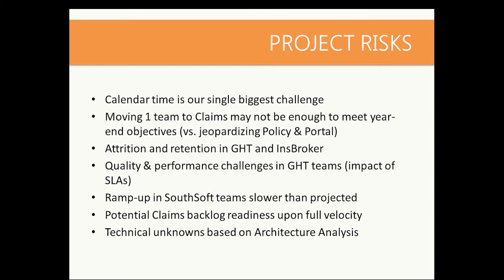And we scaled that back to a workflow of monthly sprints and quarterly release deliveries and a reduction of final test time to about a third of what they used to do in the past, and the overruns in their programs were virtually brought to a halt. So those are the largest things I've worked with.